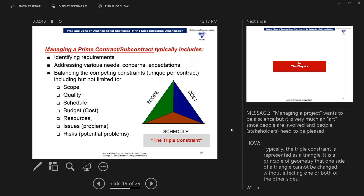At the end of the day, we're concerned about scope, because in federal government contracting that's a legal term — you cannot exercise the changes clause if it is outside the scope of the contract. The reason we use a triangle to define this is that if you change one side of a triangle, it impacts and affects the other two sides. The moment we don't properly manage scope, we're going to have a scheduling and cost issue. We call that the triple constraint.